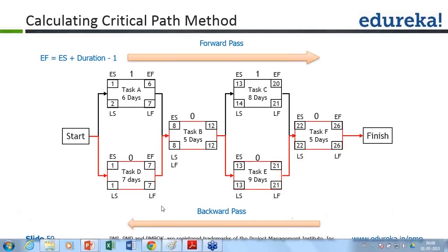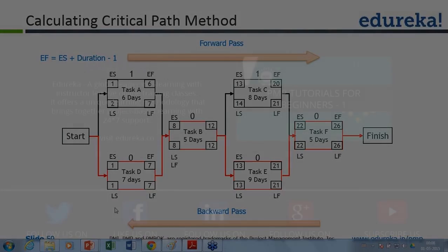So whenever you do get this question for the critical path, do not try to do any mental calculation, mental math. You will be given a piece of paper and a pencil. Draw exactly similar kind of diagram in the rough notebook which is given to you. Okay, put 4 corners in each of the box and calculate early start, early finish, late start, late finish for each activity and connect them as per the sequence or predecessor information given in the question. Then only you should do that. Okay. So this is the way we are going to identify our critical path.